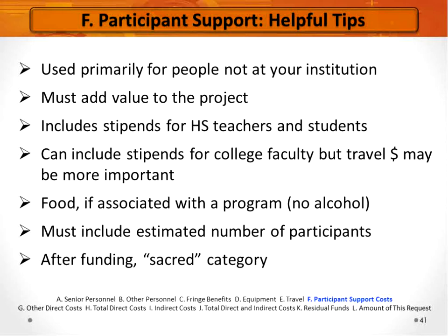If this was something that was going to happen during the year, one other thing you could put in other, potentially as a draw or to help high school teachers to be able to attend, you might be able to include and justify the fact that you would want to provide a high school teacher with an amount of money to pay for a sub so that they could actually attend. You can include stipends, but a lot of times traveling to and from is more important. Again, the food is there.